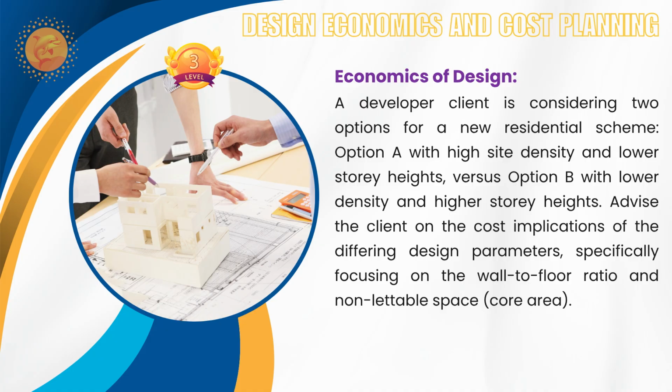So this increases cladding and structure cost, and again non-lettable space. Higher density can mean more efficient floor plates but could also increase core area because of lifts and stairs to meet fire access regulations, increasing the net to gross ratio.